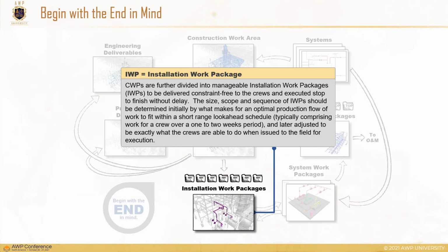The only time that you ever typically would hand off an IWP between multiple crews is day shift, night shift. You may have some IWP sharing between day and night shift, but an IWP is intended for a single crew for a set duration of time. Now, a set duration of time is often guided by the basis of being able to complete it from start to finish without stop. So therefore, it's much smaller groupings of work based on being able to send a crew in to start the tasks and complete the tasks. So when considering all those three, that's going to size your IWPs.